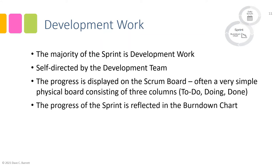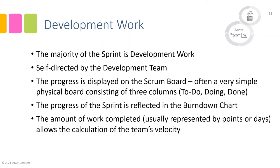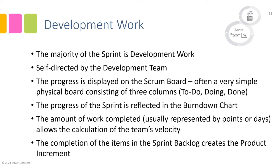The progress of the sprint is also reflected in a burndown chart, which shows the amount of work remaining in the sprint. The amount of work completed — usually represented by points or days — allows for the calculation of the team's velocity: how much work they can accomplish during a sprint. The idea is to hopefully increase a team's velocity as it proceeds through the sprints and into future projects as well.